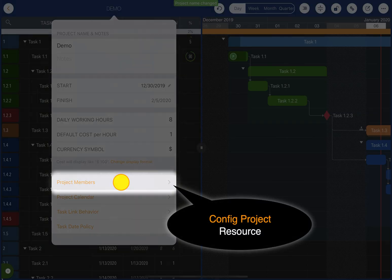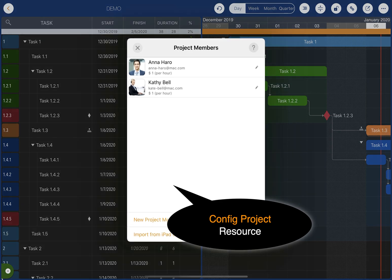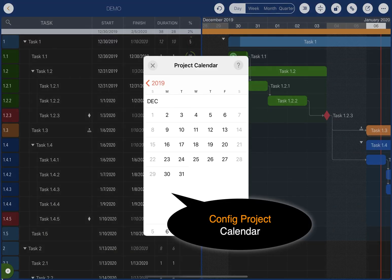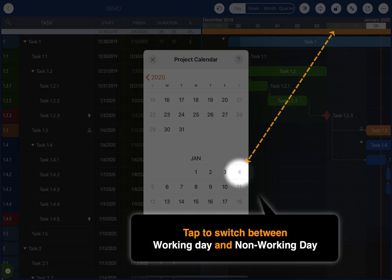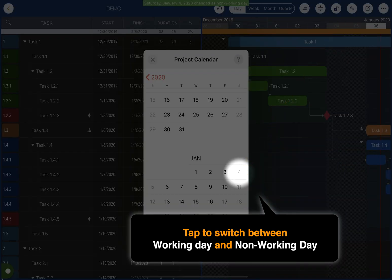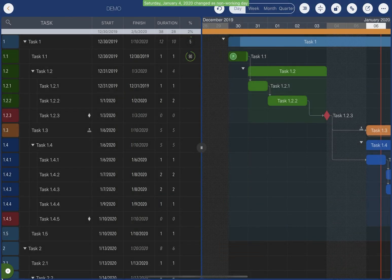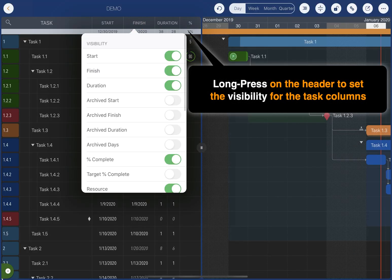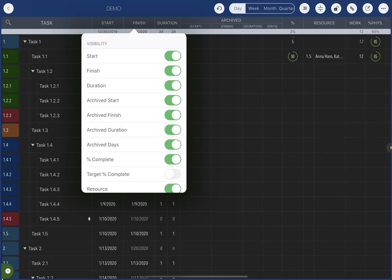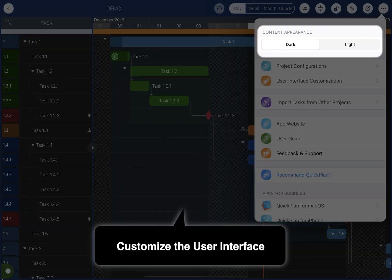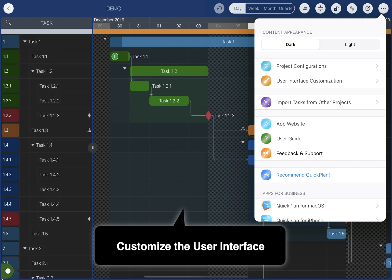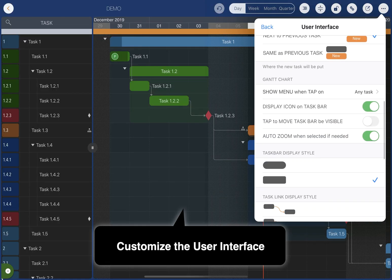Configure the project resources and project calendar. Tap on a day to switch between working and non-working days. Long press on the outline list header to change the visibility of the task columns. QuickPlan provides various options to customize the user interface.